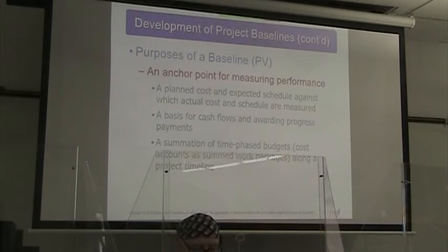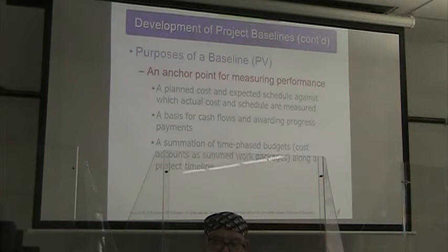So it gives us a basis for cash flows and awarding progress payments. It's a summation of our time phase budgets, our cost accounts as summed work packages along our project timeline.